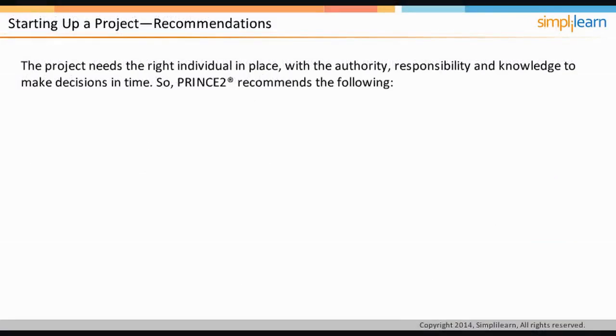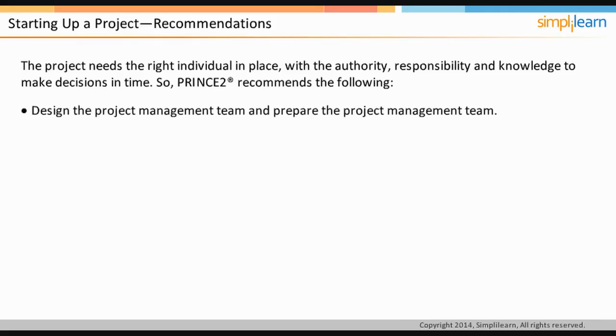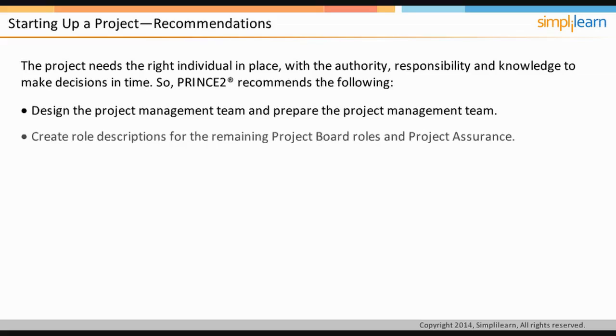The project needs the right individual in place, with the authority, responsibility, and knowledge to make decisions in time. So, PRINCE2 recommends the following. Design the project management team and prepare the project management team. Create role descriptions for the remaining project board roles and project assurance.